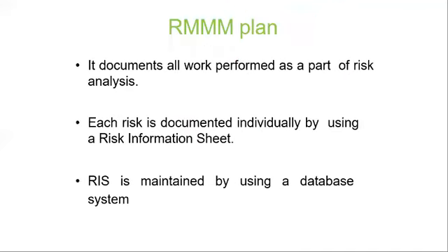Then the last is the RMMM plan. Now, this RMMM plan documents all work performed as a part of risk analysis. Now, you've done the identification, assessment, refinement, elaboration, likelihood, consequences. Based upon this, everything needs to be documented. Now, why do these things need to be documented? Because some similar risk might occur. Based upon that similar risk, you can identify what the impact was, what was done to reduce the impact of the risk, how you've controlled that particular risk. That is why you need to document the risk.